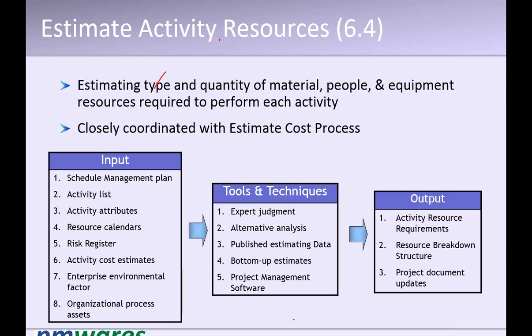Okay, so the bottom up estimates are like this: you have a work breakdown structure, something like this, and you have identified activities for it. Now you estimate this will take 5 days, this will take 2 days, this will take 3 days, this will take 1 day. Now this takes 2 days, 3 days, 1 day, 1 day.